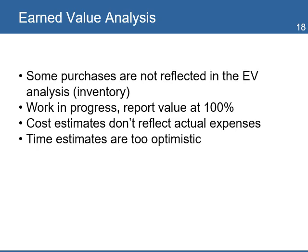Work in progress: you're not only reporting earned value at 100% or when a center is fully completed, but you're not taking into account those centers that are still under construction. Cost estimates don't reflect actual expenses — the material may be costing more than what was originally estimated. And time estimates might have been too optimistic.